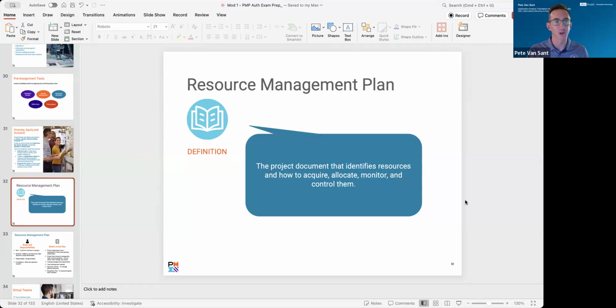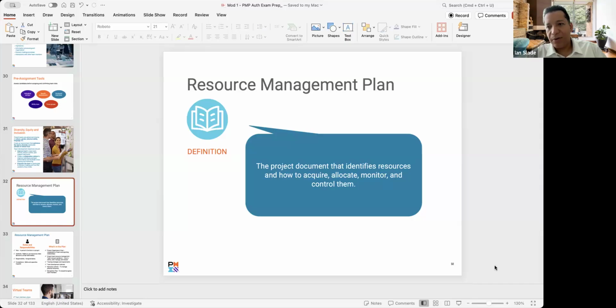I don't recall. I was going to ask to go back to the stakeholder register and get a refresher on that. No worries. So when you hear the word resource, remember the word task. Resources are assigned to tasks, right? So if you're planning a retirement party, your resources are the people that pick up the cake, find a room, send out the invite. Those are your resources.